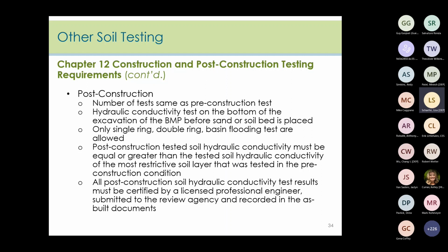The tested soil hydraulic conductivity from the post-construction test must be equal to or greater than the tested soil hydraulic conductivity of the most restrictive soil layer that was tested in the pre-construction condition. And lastly, all post-construction soil hydraulic conductivity test results must be certified by a licensed professional engineer, submitted to the review agency, and recorded in the as-built documents. This is also something that we didn't always see in our audits.